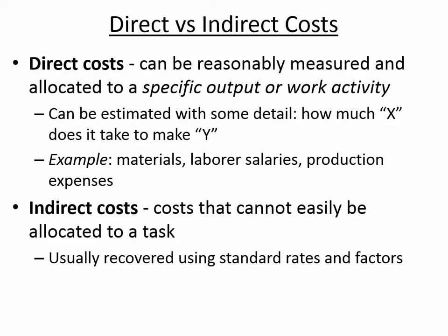The plans that the structural engineer produces may say the volume of concrete, it may say the amount of reinforcing steel, but it doesn't say we need 3 supervisors on site for a total of 87 hours. And it definitely doesn't say what the supervisors should be paid. That's something that's a lot more difficult to find out. And so it's not easily allocated to a specific task.